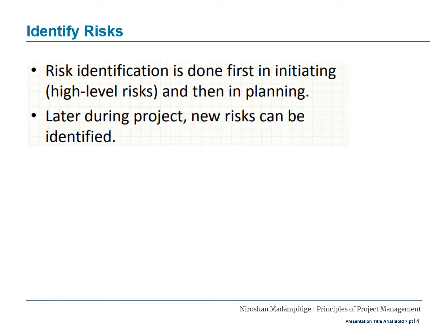Risk identification is done first in initiating, high-level risks, and then in planning. Later, during the project, new risks can be identified and the existing risks will be maintained and updated based on the progress.